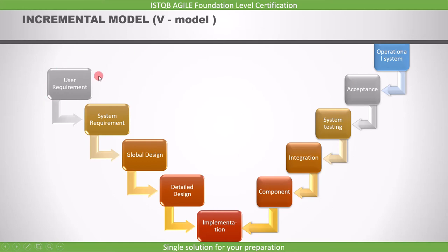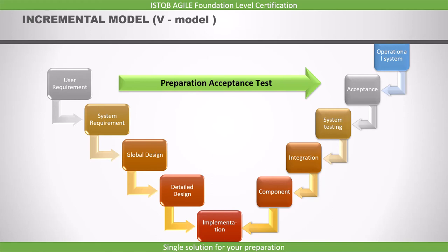Once you have the user requirement, even if you have not done any of the steps below, you can start preparing test cases from the requirement for the acceptance testing. Similarly, when you're in the system requirement stage, you can start preparing for the system test. Since you have the requirements, you can start writing the test cases. Once the software comes, you can execute them. The process is happening in parallel — when the development activity starts, the testing activities can also start at the same time.